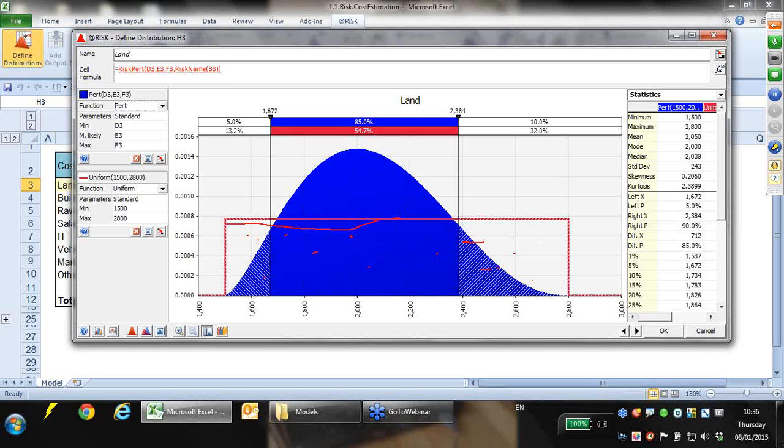You have a straight line that goes across here, and so the samples are just as likely to come from any part of it. With the PERT distribution, you have this bias towards the middle point here, whereas with the uniform distribution it's just a straight line. And so what that means is that the tails are emphasized a lot more, because there's a higher surface area for the samples to get taken from.